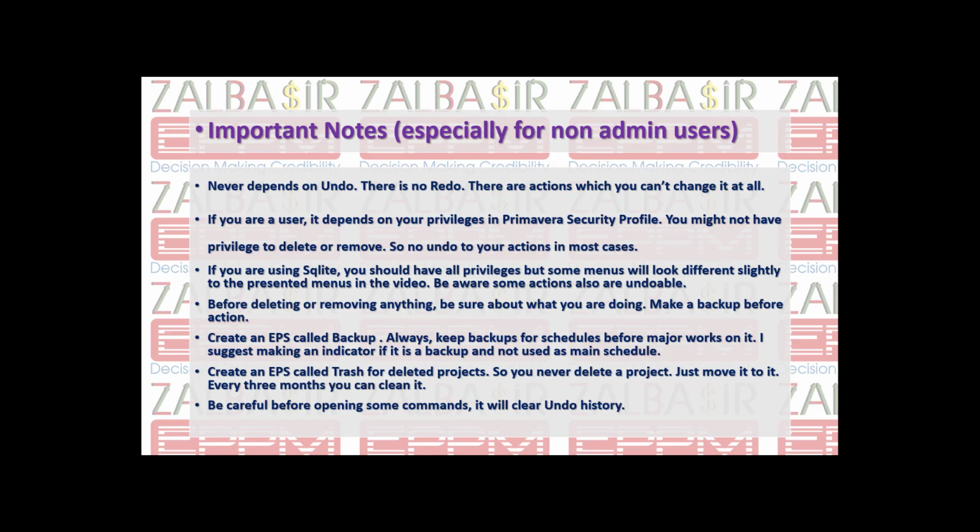Create an EPS called also trash for deleted projects, or call it deleted projects. So you never delete a project, just move it rather than deleting. Every 3 months you can clean them. Be careful before opening some commands. It will clear undo history.